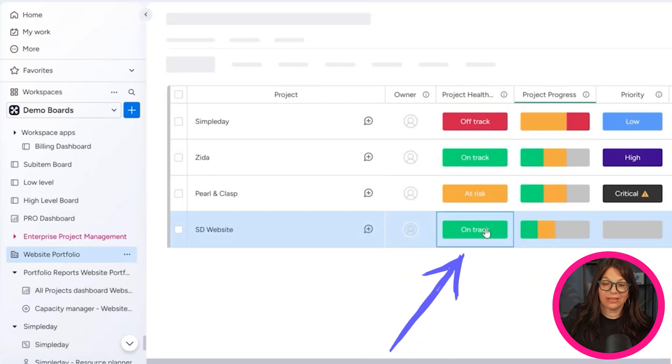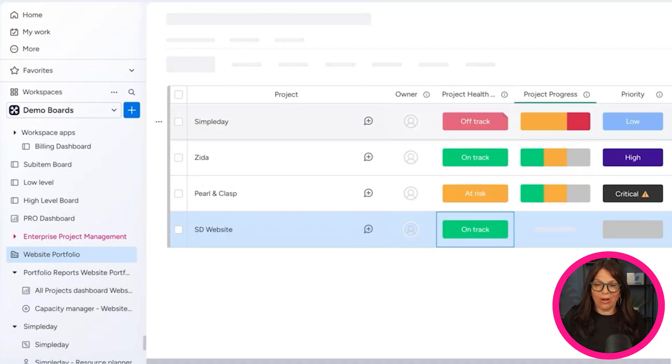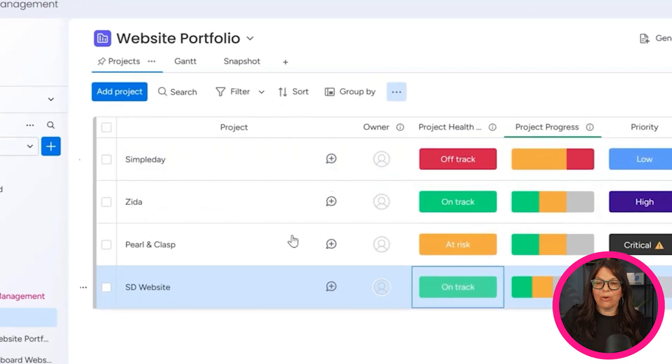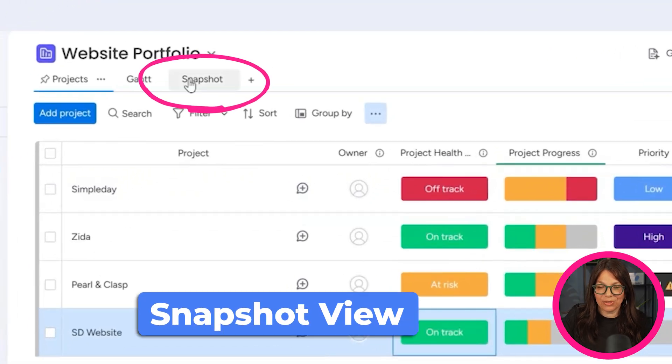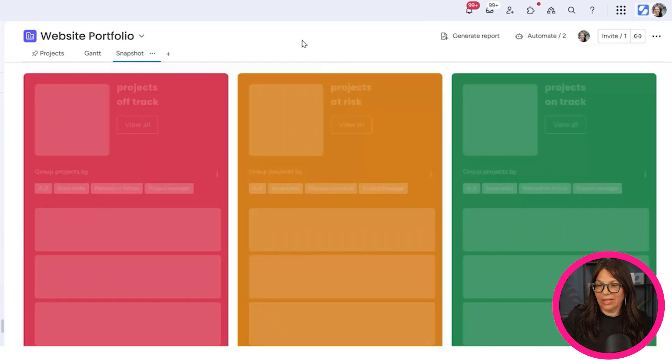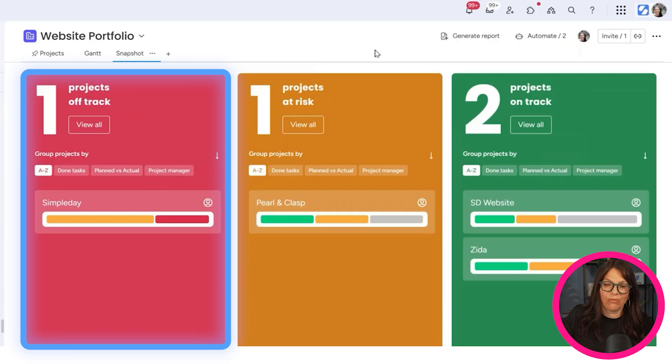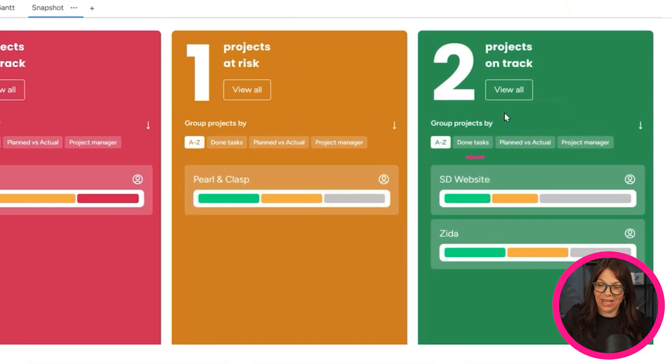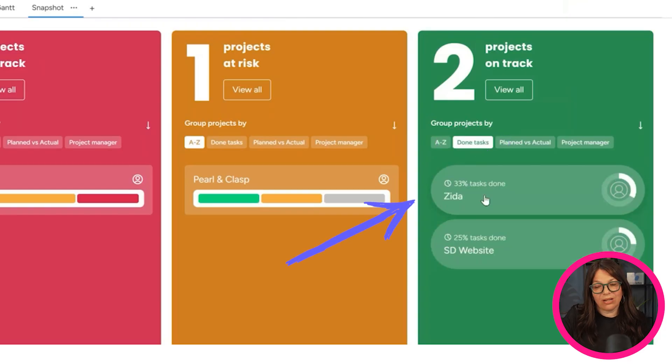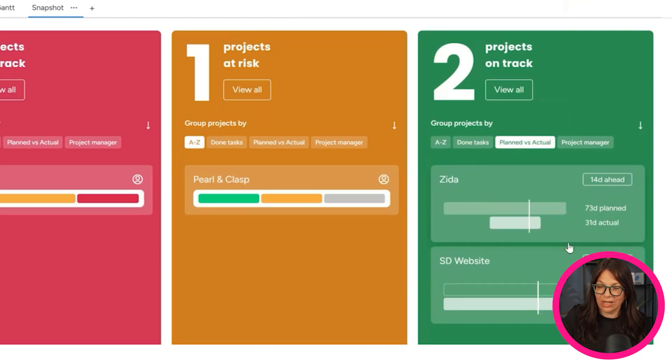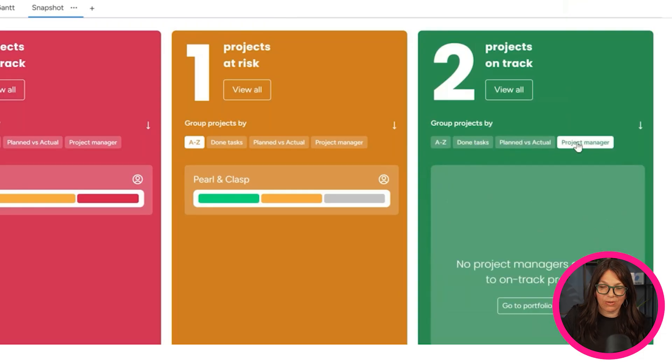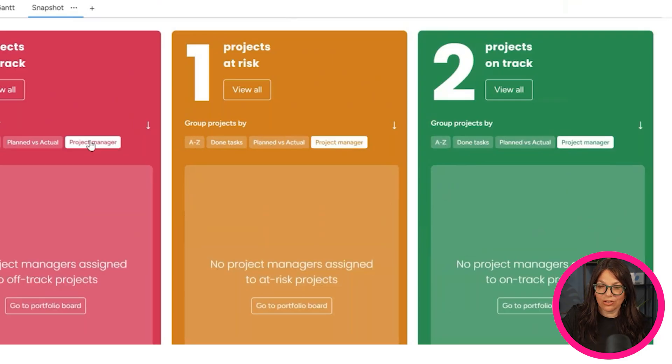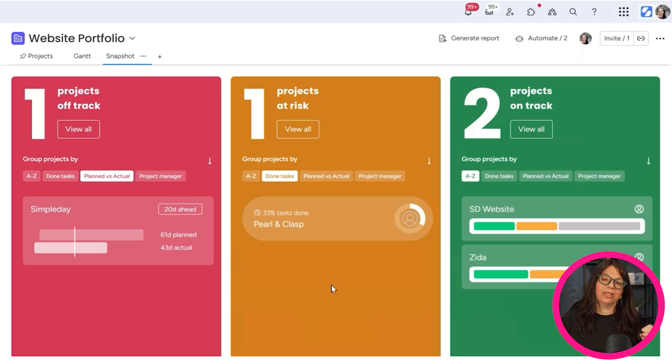Now, the cool part about this is it's true that you can look at this view and you have a regular view. But imagine if you had 30 projects. So again, you need to scroll, which is not great, but what Monday added is this snapshot view. And this I think is great. This snapshot view is basically like a dashboard, but it shows you the different categories of your project. So here we have one project off track, one at risk and two on track. Within this, you can also see this is 33% of the way completed. This is 25%. You can see plan time versus actual, where you're holding in terms of that.